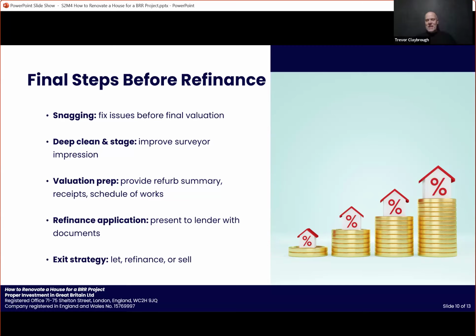Yeah, if it's a limited company, we're going to be looking at their accounts online. Sometimes we might ask for a copy of their balance sheet or their latest accounts if the filed accounts are very old. And sometimes we'll ask them to sign a contract. There's always a possibility that a main contractor will run out of money or get into problems. So the question is not necessarily to have immediate backup plans, but to have a reasonable level of control over the money you're paying, so that if something does go wrong, it's not 10 or 15,000 that you've lost. It might be 5 or 6,000.